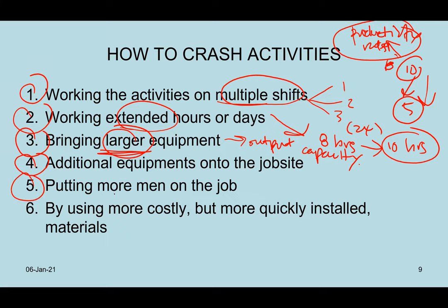Number five, put in more men or more labor workers. For sure, when you bring more people to the construction site, they can do many works at the same time in different areas. Everything will be completed much faster. But putting more people on the project, you need to pay more. And that is how the cost will increase.